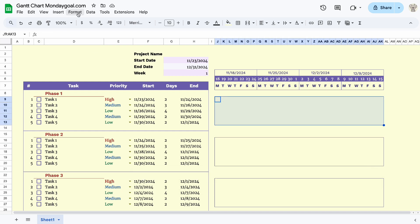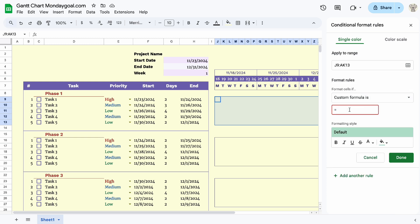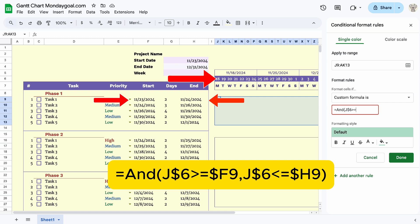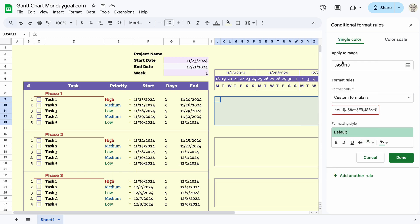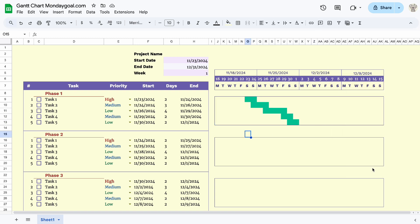Let's set up the chart. Using conditional formatting, select custom formula. With this formula, we check whether the days between start and end date match the date in our calendar. Now you can change the color — let's change the date to see if it worked.